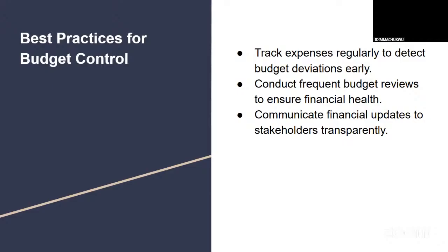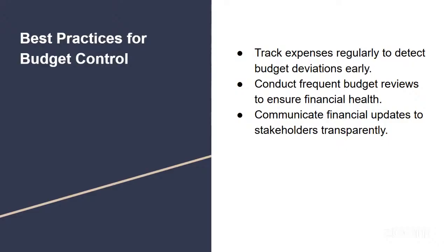I'll say it's not a scope creep. Scope creep is whatever is going to either increase the already laid out budget or increase the time that was actually agreed upon. So it affects one of the triple constraints, which is the scope, time, or cost or budget. Okay, all right, thank you.